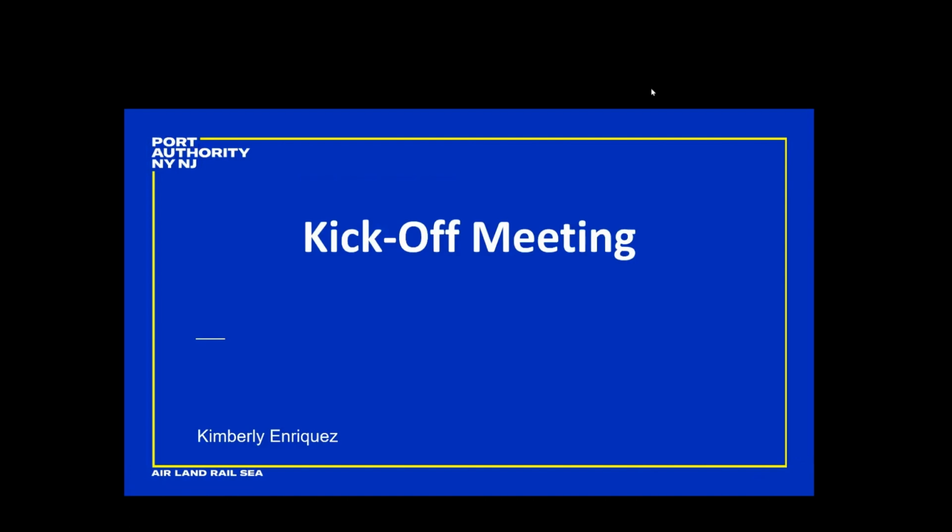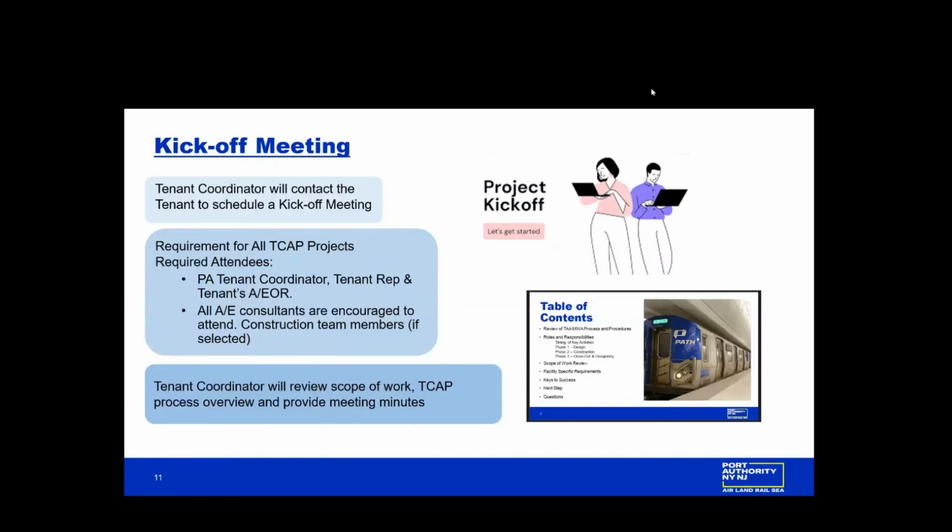Okay, we'll move into the kickoff meeting. The kickoff meeting, which is scheduled by the tenant coordinator, is a requirement for all TCAP projects. And again, you'll have more information on the TCAP process and how to move forward. The required attendees, again, are the tenant coordinator, tenant rep, and the tenant's AOR, as well as any architectural or engineering consultants who are encouraged to attend, as well as construction team members if they're selected at this time. So again, the tenant coordinator will review the scope of work and the TCAP process, and provide meeting minutes at the end of the meeting.